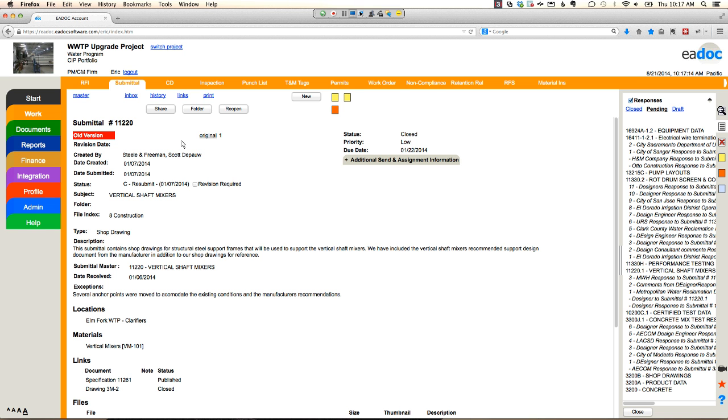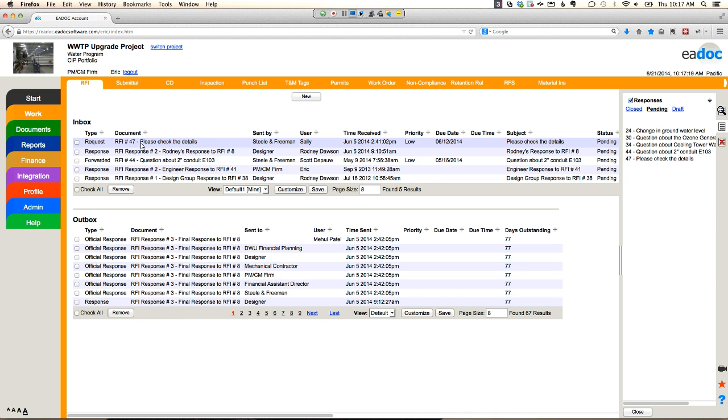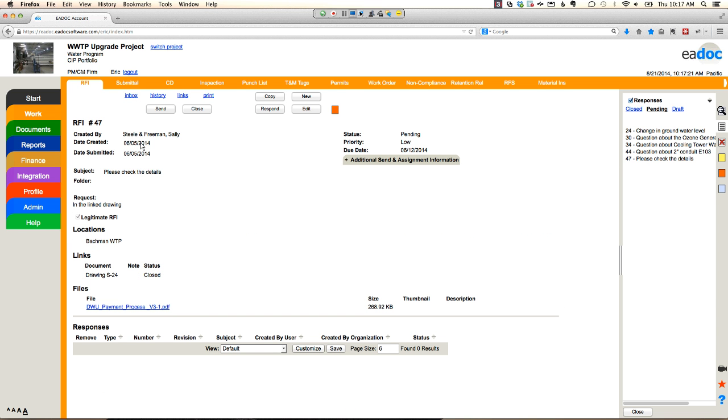And we're doing this with everything. We want to track the submittals in the system. We're tracking the RFIs here for you guys in the system. And you'll see I can even have layered fields where I can flag RFIs as a legitimate RFI or as a bogus RFI if my contractor is just trying to flood me on my project. So I've got some very powerful tools as a project manager to try and mitigate cost, mitigate risk on this project, and track all this information electronically.